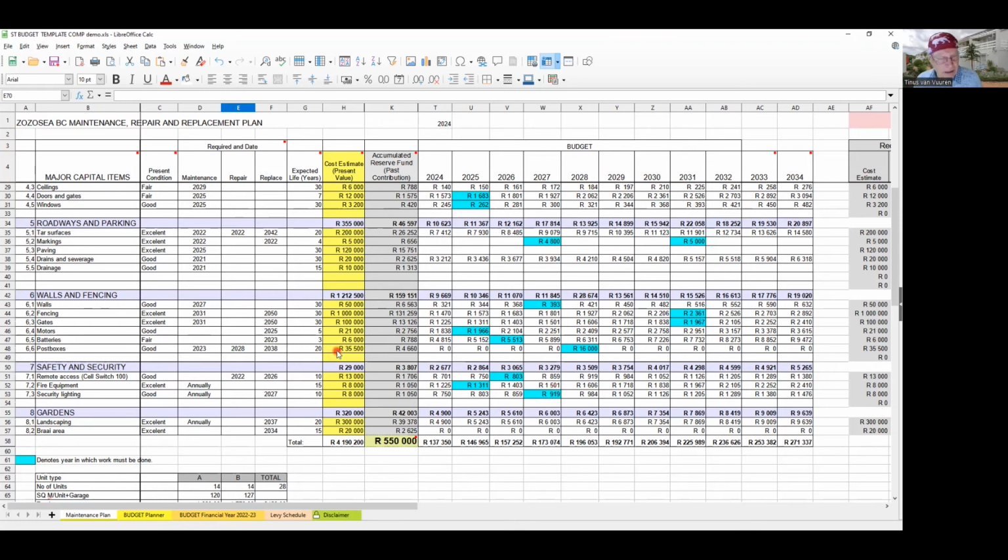It cost us about 30,000 Rand when we did it, so I estimate that if I have to replace it now, it's going to be 30,500 Rand. That is fine, it is not a huge amount. Even your batteries, you don't have to make provision every year. You can just say, every 3 years, I put in the full amount.